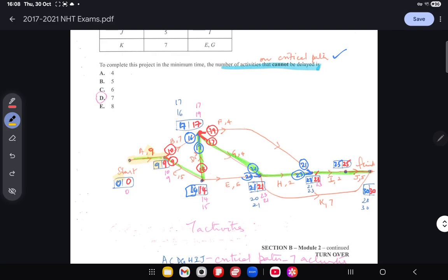So that's 1. And then I have an option either to go 9 plus 5 is 14 or 9 plus 7 is 16. Obviously, I'll choose the 9 plus 5 is 14 option, because that gives me 14 and 14 here. And then 14 plus 3 along D is 17, and both are equal there.